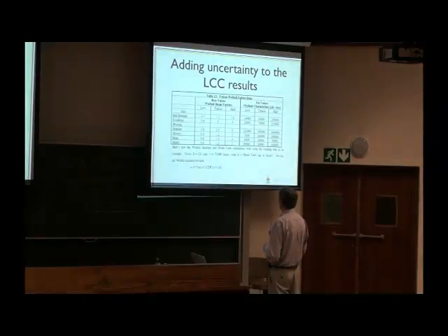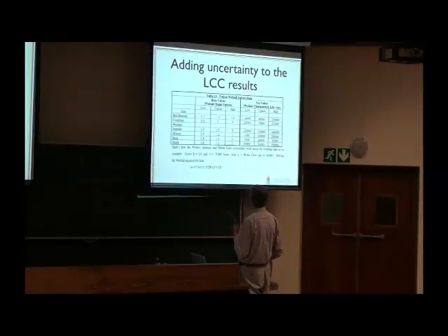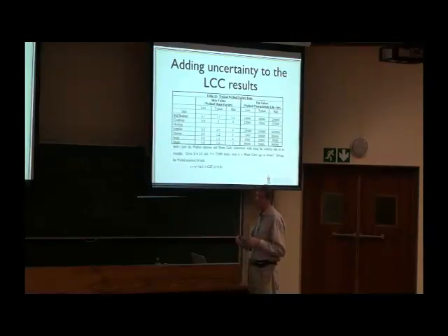So now you have your equation. I'm not sure, one will have to check on this equation. I think this should be F(t) if I'm putting it that way. But in any case, what is a Monte Carlo age to failure solving the Weibull equation for time? So by when will it fail? This is f(t), the density function. The cumulative distribution function, the capital F(t), is this. So it is the natural logarithm of 1 over 1 minus capital F(t), all of that to the power 1 over beta, and that times eta gives you the time to fail, and you then use that in a Monte Carlo simulation.